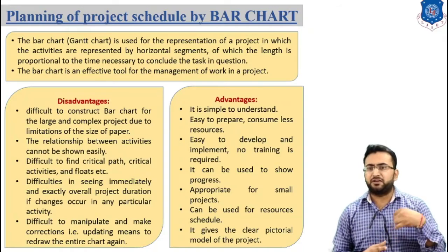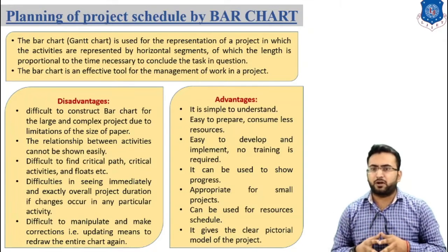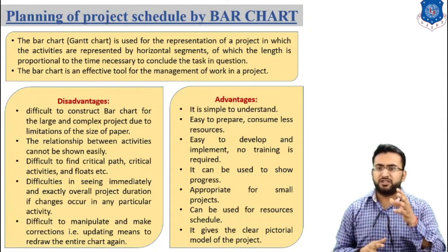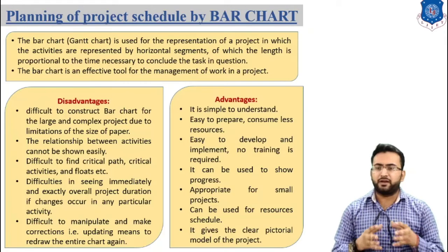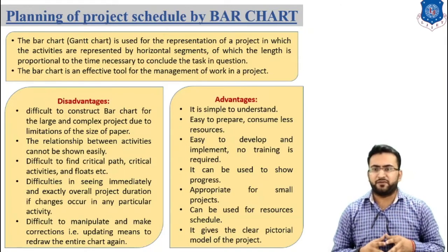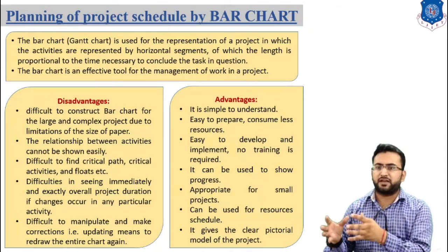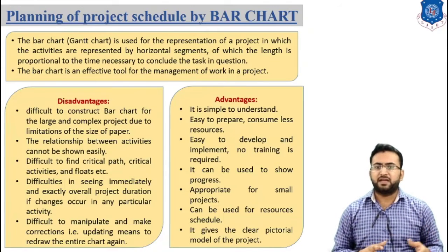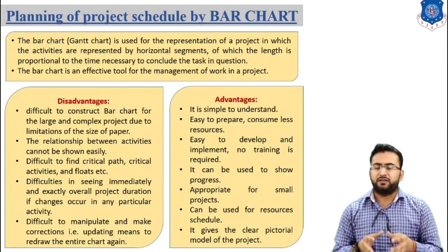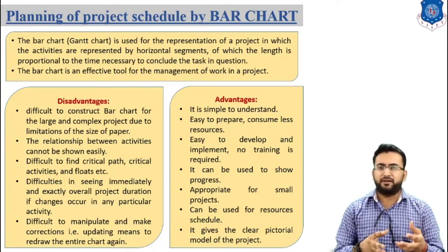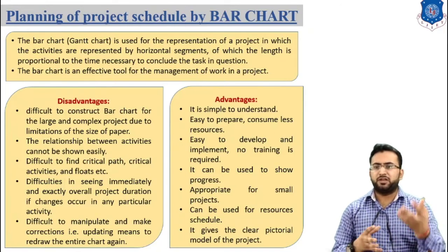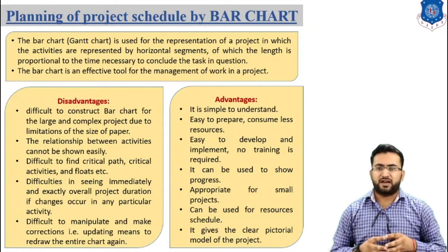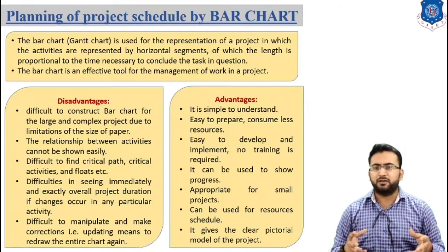It is difficult to see immediately and exactly the overall effect on the project when a change occurs in any particular activity, and it's also difficult to manipulate and make corrections in the chart. So we can say it is difficult to update the bar chart. If we update it, we have to redraw the entire chart. So this is a disadvantage of the bar chart.